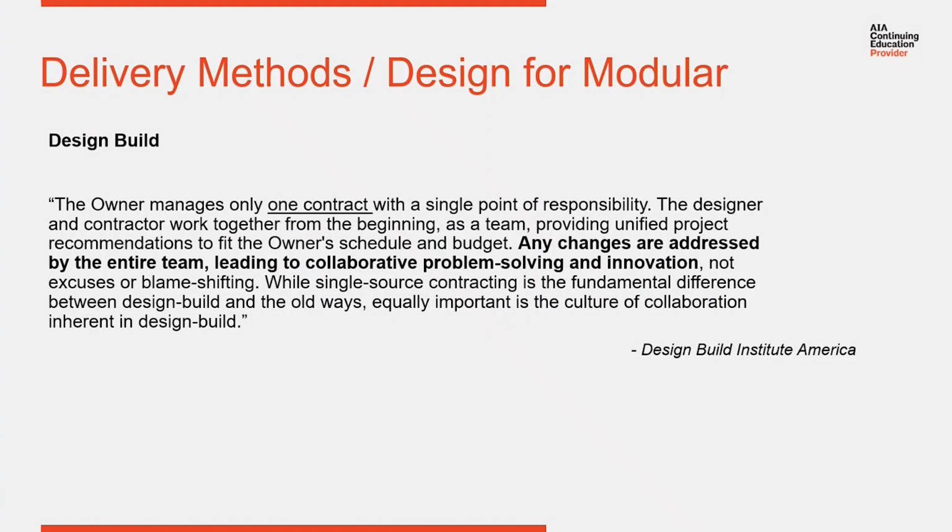The owner manages only one contract with a single point of responsibility. The designer and contractor work together from the beginning as a team, providing unified project recommendations to fit the owner's schedule and budget. Any changes are addressed by the entire team, leading to collaborative problem solving and innovation, not to excuses or blame shifting. While single source contracting is a fundamental difference between design build and the old ways, equally important is the culture of collaboration inherent in design build.